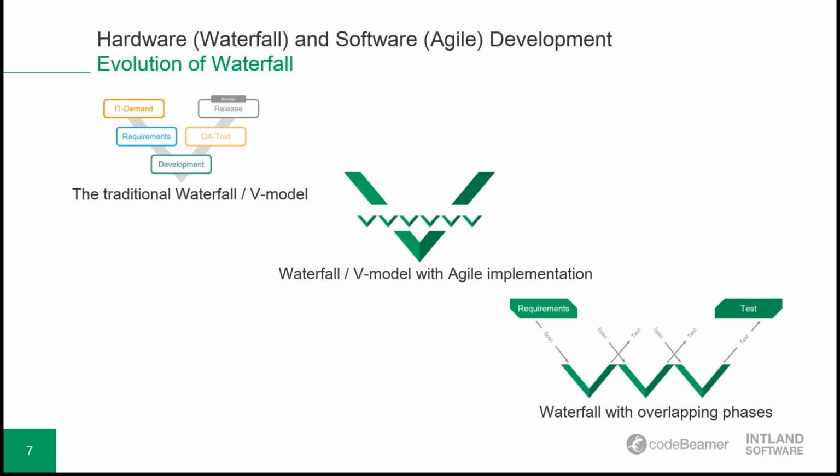So, the waterfall with agile implementation. It is often the case that by the time the embedded software is integrated with the hardware, the original project specifications may have changed enormously, or the technology might be outdated. So applying agile processes into a waterfall project, you can split the traditional waterfall development cycle into smaller incremental waterfall models. You can also call it a series of mini Vs, and it enables you to alter product requirements and make some changes. I will show you when I talk about the pros and the cons.